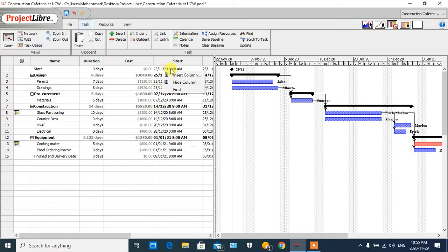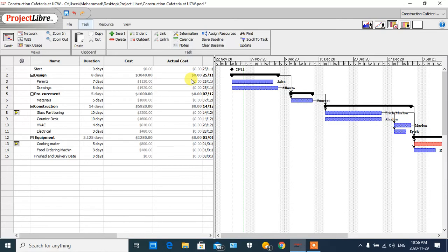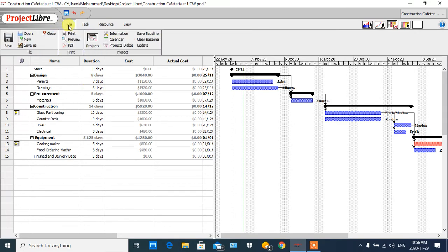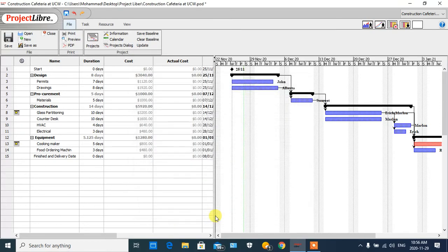The other column I want to insert is 'Actual Cost,' which shows the cost for completed tasks and also for partially completed tasks. To demonstrate this, I click on 'File,' then the toolbox, and then 'Information' to define the status date. Today is, for example, November 29th. As you can see, this is the green line that shows today's status date of the project.